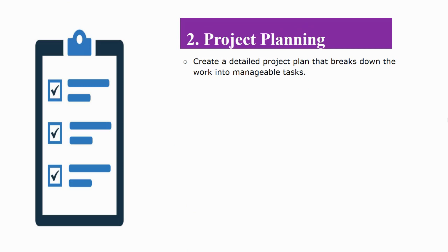Apart from that, to construct the hand pump, you might need to do procurement of the materials, transportation of the materials, and all the different arrangements that need to be put in place. We also need to design the hand pump, on how it's going to be, by the engineers and other people. And there might be some work like groundbreaking and several other things that we need to do. So all the smaller tasks that we are going to implement to get the hand pump constructed must be broken down in the planning phase.